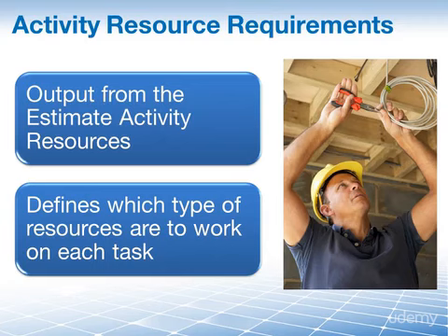And this normally doesn't mean that you can just go at it mathematically and say, well, if 2 electricians take 9 days to install a generator, then how long will 1 electrician take? The answer is more than double the time, because these 2 specialists, they need to work as a team and help each other. If only 1 is available, then he may not be able to even install the generator because he needs a partner to work with him.